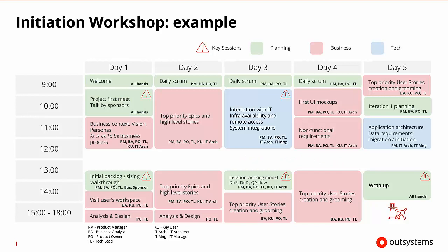For projects that are larger than maybe a 12-week project, it may be recommended to have another week of initiation workshop. So instead of 1 week, potentially a 2-week initiation workshop that will allow more time to gather the type of information needed when the project is significantly larger. That way the dev team can settle all of the different things that may be in their mind and focus on the analysis and solution in those design activities.